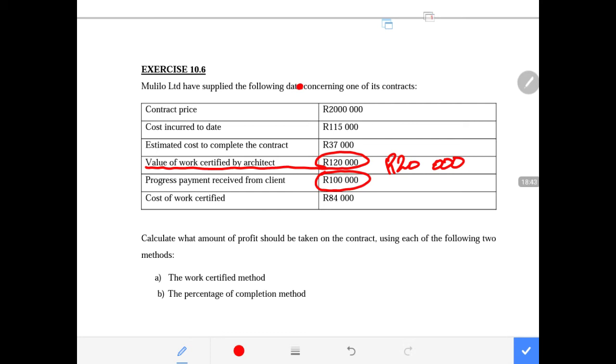Why are you keeping part of the amount that you are paying? It is because if the work that the person is doing is not good work, then you can call them back and say, this is not well done work, so please come back and do it. So always retain money from the person doing a project for you, so that if they did not do work of good quality, you can ask them to come back and complete it.